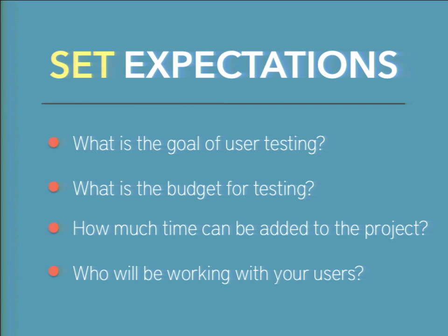What's the budget? Can you spend $100, $1,000, tens of thousands of dollars? That's going to probably decide when you're going to test and what kind of testing you do. The time you can add. I would say the average test that we do, and we do a lot of remote testing online, adds about 2 to 3 weeks to any project, and that's per test. You're going to make a product, post it up there, have people test it, iterate, post again, test, iterate. It takes a couple weeks to do that. Are you able to add 2, 3, 4, 5, 8 weeks to a timeline?